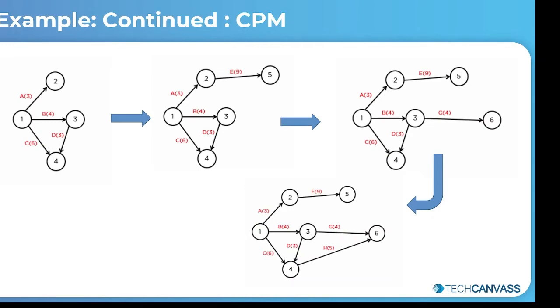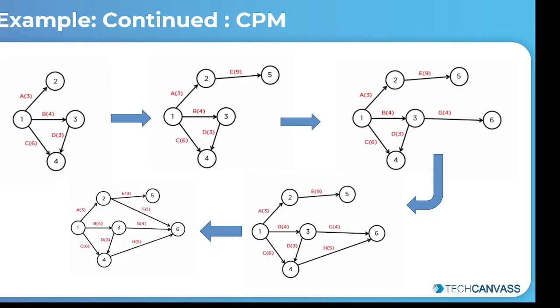Now that we have done that, let's go back to activity F. Now that we know where activities G and H connect to, we can combine nodes 2 and 6, fulfilling the conditions required for activities K and L. So now the network diagram looks like this. You just have to keep the table in mind and we will proceed with the other network diagram.